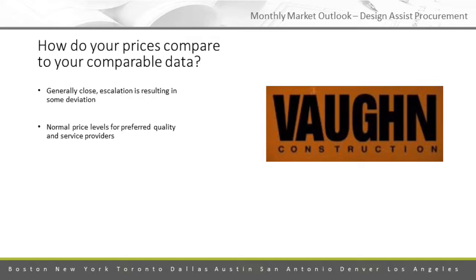There are schools of thought on both sides of that, but I think the important thing is just addressing escalation as it relates to both the sub's estimate and the CM's estimate, to make sure that you're tracking that correctly, because I think a lot of the disparity that we're seeing in numbers these days is because people are doing different things. I know from personal experience, that's what I've seen in some of that big sway is people are projecting within their estimates larger percentages than some. So the easiest thing to do is just level the playing field one way or the other.